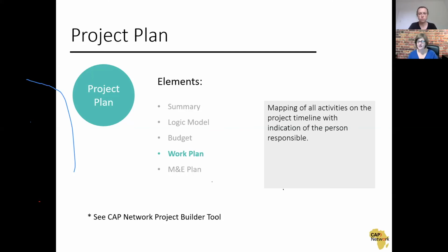So if you've really thought through your timeline really well, then you should have a little bit of a buffer at the end. So if you've really allowed, say, the 2 months at the end of your 12-month project to be all about monitoring and evaluation and reporting on results, then if you end up spilling into that with project activities a little bit, you're still okay.